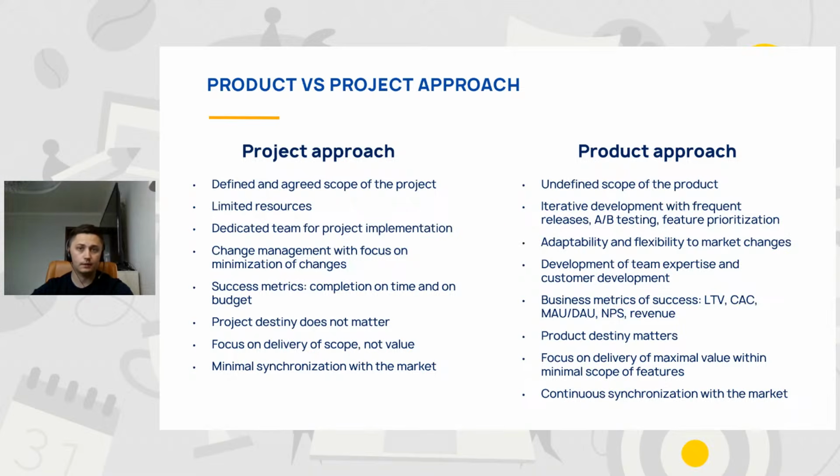You can say that iterative development is also available in project approach. Yes, this is so, but usually it's not, let's say, real agile or Scrum, but something like iterative waterfall when you have a defined and agreed scope of features which you want to deliver, and within the next release we deliver them. With the product approach, we can deliver new features even every day, and besides delivery, we also